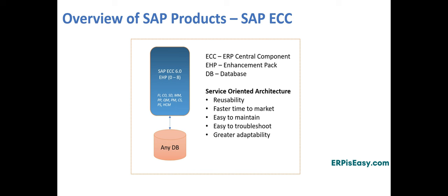A dedicated client in the UAT system may be created to perform the dress rehearsal, or a dedicated dress rehearsal system may be created. The transports will be moved first, followed by the data load to the dress rehearsal system. The time required to complete all these steps is calculated to estimate how long it will take to achieve them during the production system's go-live.